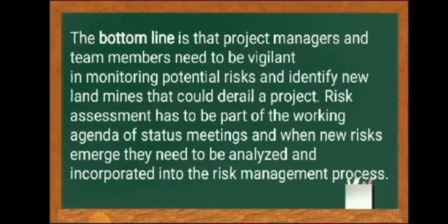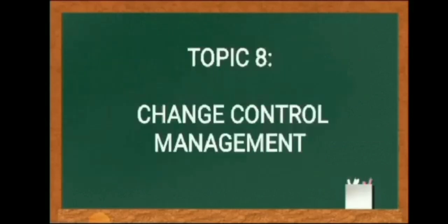Risk assessment has to be part of the working agenda of a status meeting. And when new risks emerge, they need to be analyzed and incorporated into the risk management process.